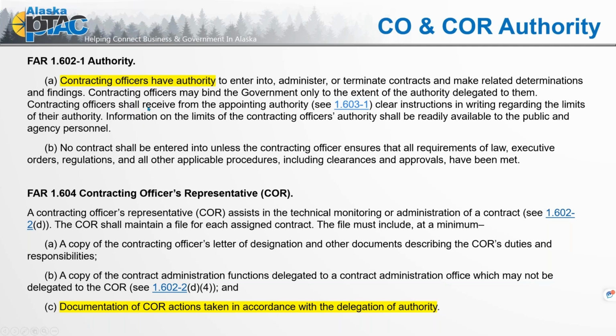The contracting officers have different warrant levels, and they can't act on a dollar amount. So if the contract changes might exceed their dollar authority, they might have to bring in a different contracting officer with a higher warranted amount.